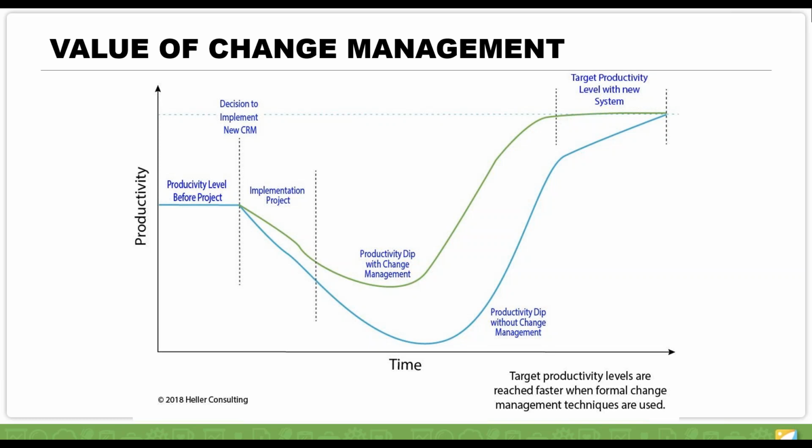Ultimately, if we employ change management tactics and make sure that everyone is aware of how they are participating and the value that they bring into change initiatives, what that has shown consistently over time in research, again, through ProSci, that they have done is, no matter what, with any large initiative, and this one is a technology implementation, the line on the bottom, which is teal or blue, if you can see colors, there's a dip. It's a productivity dip.